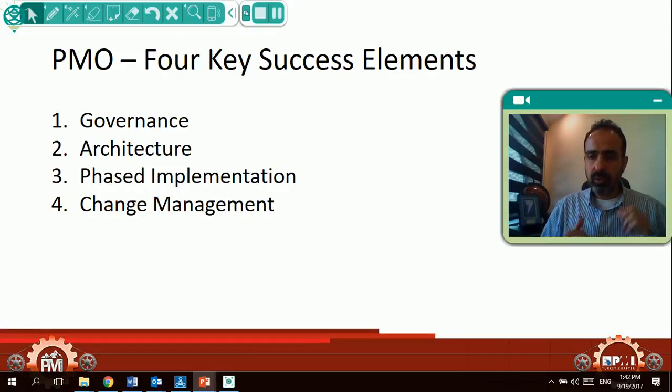it will do, how it interfaces with the rest of the organization, what are the KPIs for it, what are the objectives, what is the strategy, how does it align with the strategy of the organization, the resources needed, the organization structure, the PMO structure, how projects will be handled, the types of projects, etc. And this must be customized to the organization. This cannot be generic. It has to answer how does this PMO fulfill the strategic objectives of the organization. So this is architecture. This is the big picture.